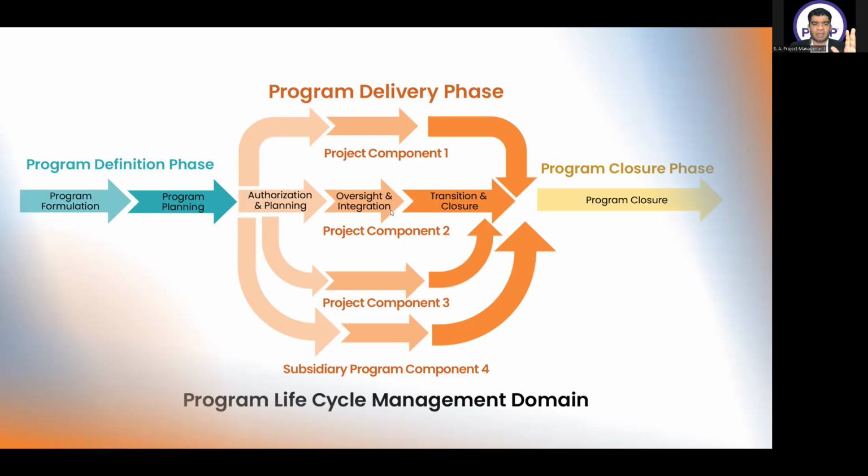So in broader terms, I will be doing something in the program definition phase. I will be making some documents here that will guide me and advise me on what I have to do in the program delivery phase. And what are those documents? We will see later, but the business case, charter, and program management plans are made in the definition phase. Then we come to the delivery phase where we work on all the components.